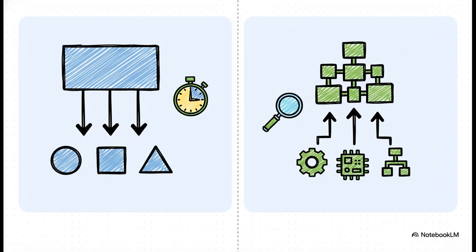Bottom up, as you can probably guess, does the exact reverse. You meticulously figure out the cost of every single little task and then add them all up to get your grand total. It takes a lot more time and effort, but the result is usually way more accurate.